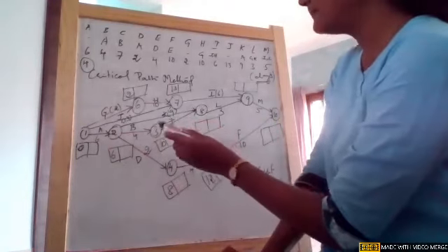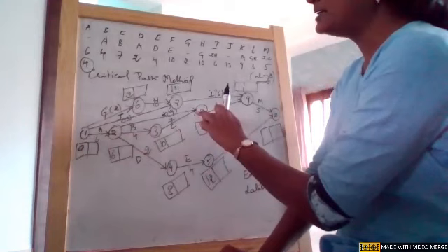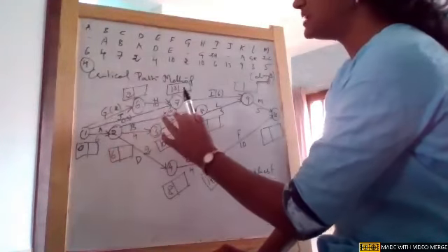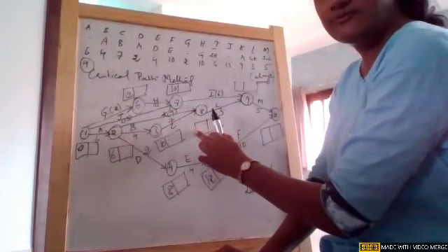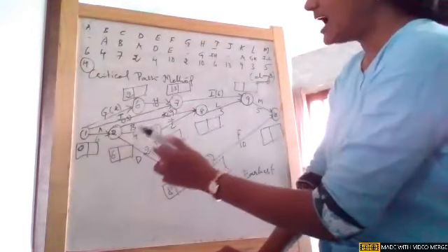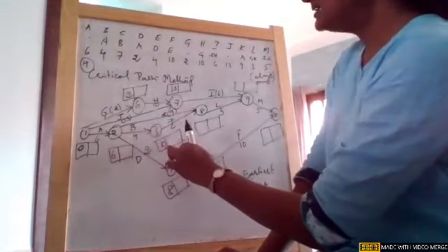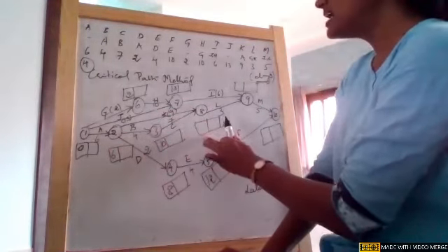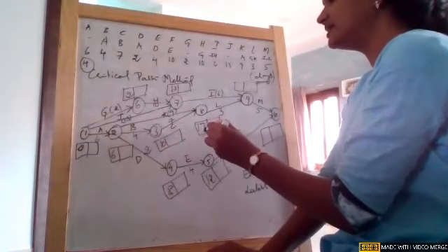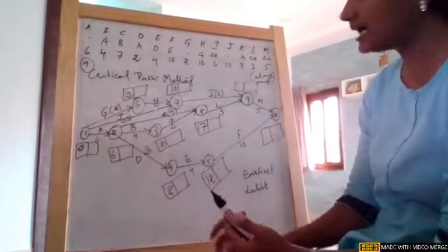We'll complete the other part. Now if you see near 8, again there are 2 arrowheads. One is 6 plus 9, which gives us 15. And the other duration, 10 plus 7, gives us 17. So obviously 17 is the maximum value, so I am taking that here.